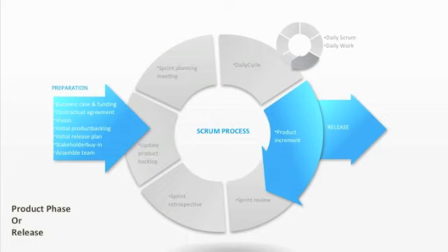In the simplest terms, Scrum begins with project preparation. The backlog is updated, typically with a backlog grooming session. A sprint planning meeting follows. The daily cycle begins with the daily Scrum and the team's work. The product increment, or a release. A sprint review and retrospective takes place. Then the cycle begins again.